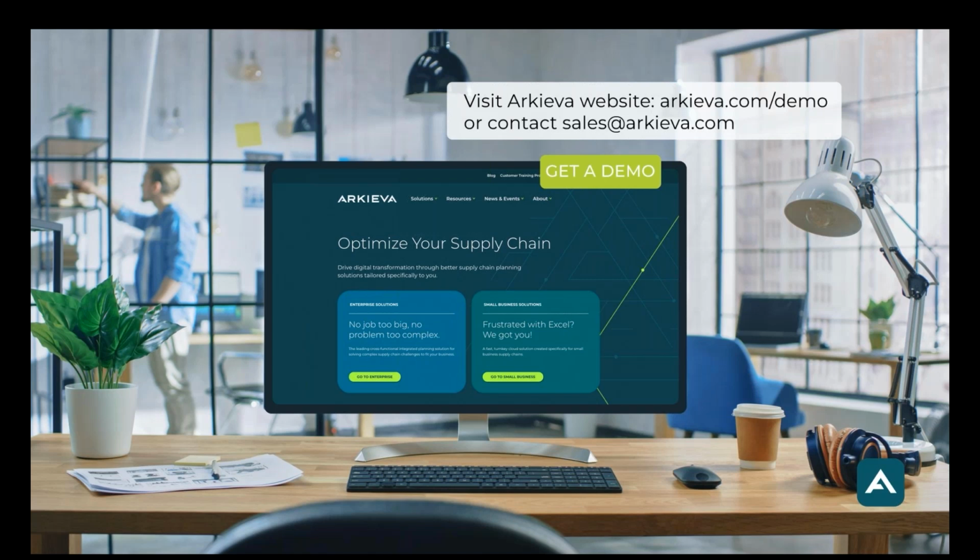Process changes should not be on the tail end of the software implementation. So if that's how it somehow came across, let me be very clear. Process is either in the beginning, upfront, or side by side. Upfront mostly when it's wholesale changes, side by side when mostly it's incremental changes. So hopefully that clarifies.